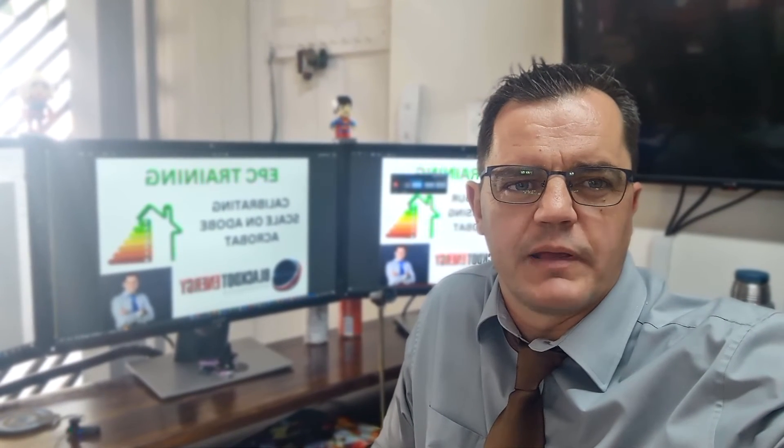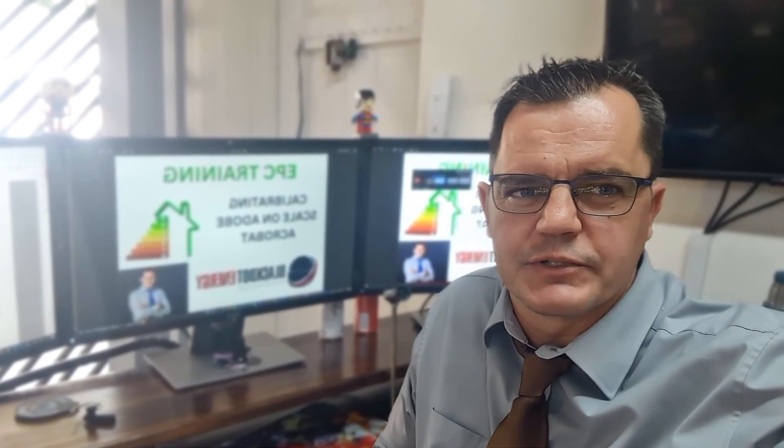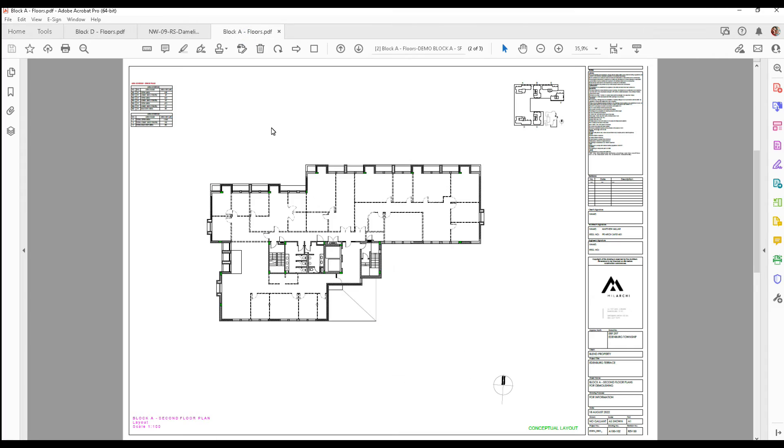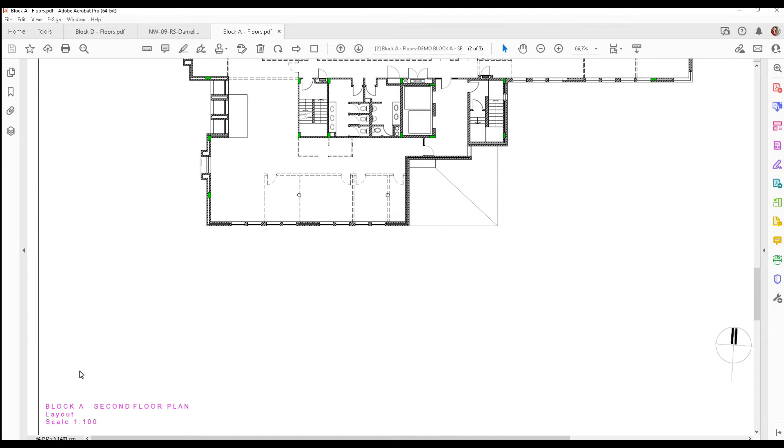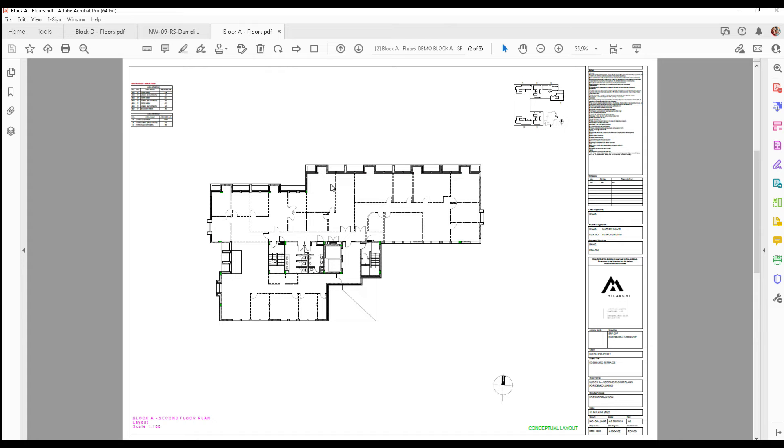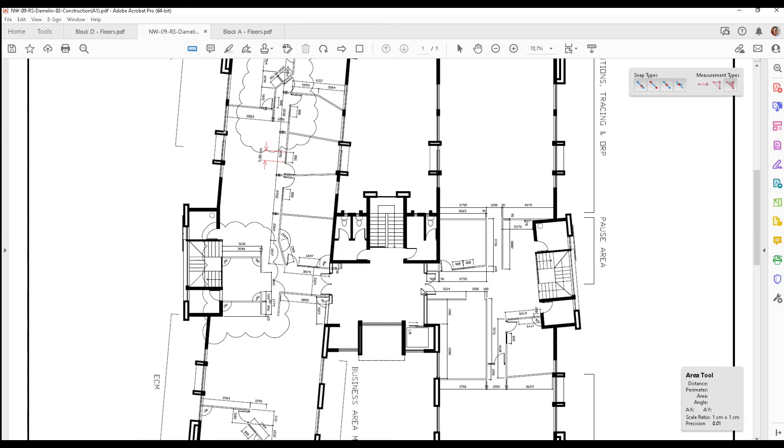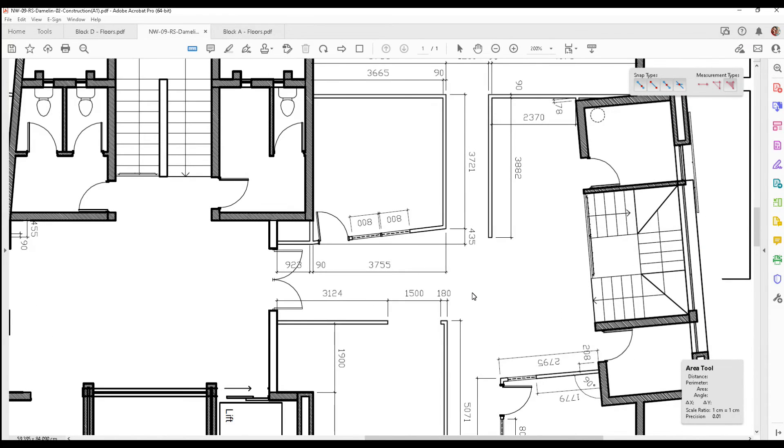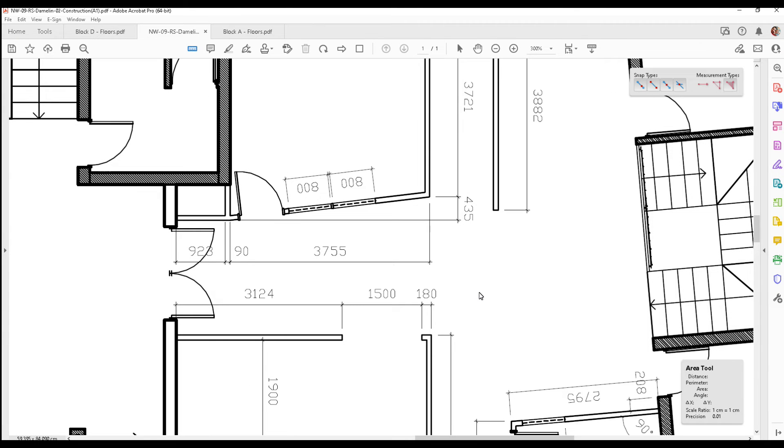Just a quick interruption to remember to like and subscribe this video so that you can also receive notifications on any other future training videos. On this drawing you can see that it actually gives you the scale at the bottom, so one centimeter equals one hundred centimeters would be the scale for this drawing. Here your scale would be one to one hundred.